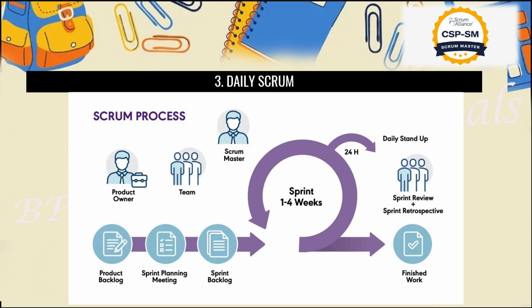In the last part, we can go with one example, the same website example we have discussed. We have a product backlog, our owners, Scrum team, developer team, then the product owner, right? We have a product backlog, that is website development. Now we picked up one sprint, that is the home page. We understood the sprint backlog for that home page. So what backlog was generated? About us details, banners, home page titles. We also required contact information, footer details, and some about us information in the middle of the page. All this goes in the sprint backlog.